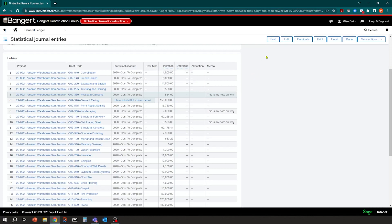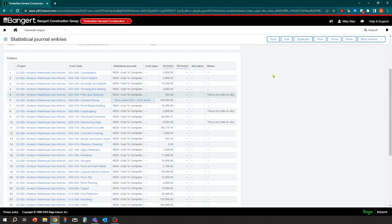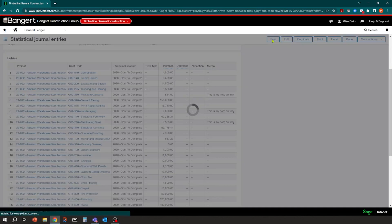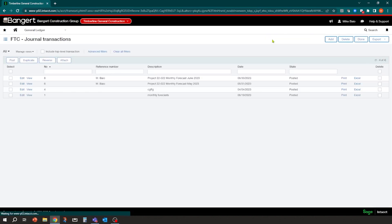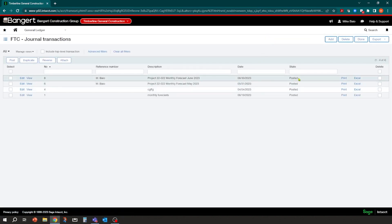Now what's really nice is you'll notice you also have this duplicate. So if you wanted to do your projections right from this screen, you could click duplicate from last month's. It'll bring it all in. And then you can just go make the changes and change the date for the next month. And then post it in as well. So you can do it that way too. So there's a lot of different ways you can do this depending on how you want the flow to work. So I'm going to click post here. And now you'll notice it says posted. So now I know it's part of my numbers.